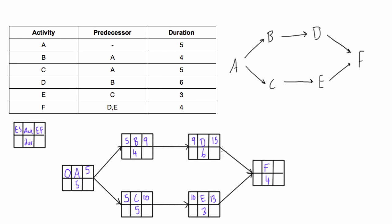So we bring the 15 into the early start of F—the largest early finish becomes the early start of the succeeding activity. Then we have 15 plus 4, and the earliest finish of F is 19.